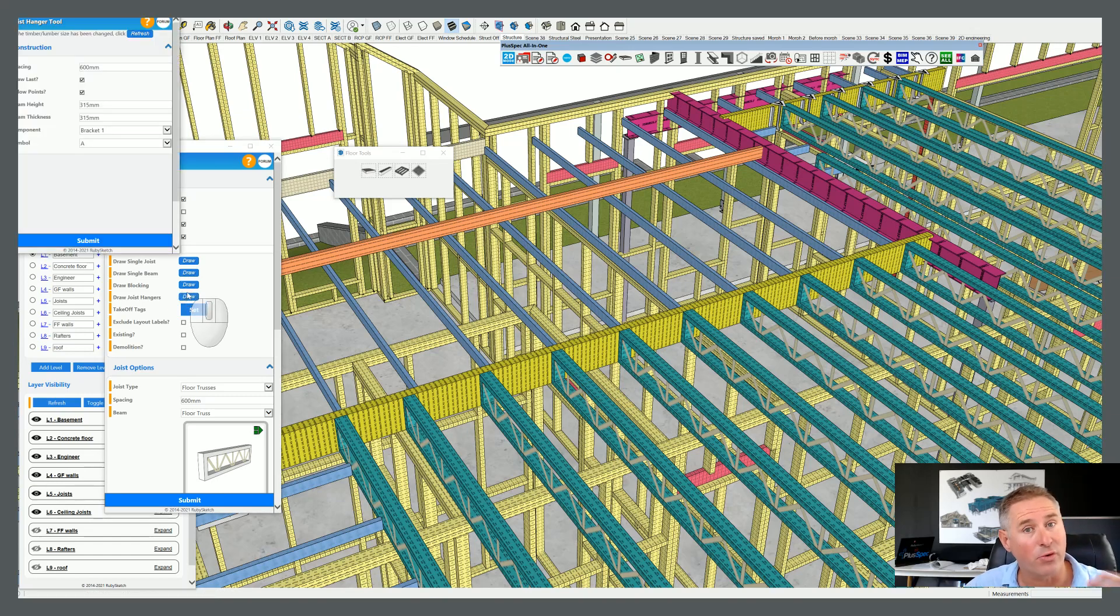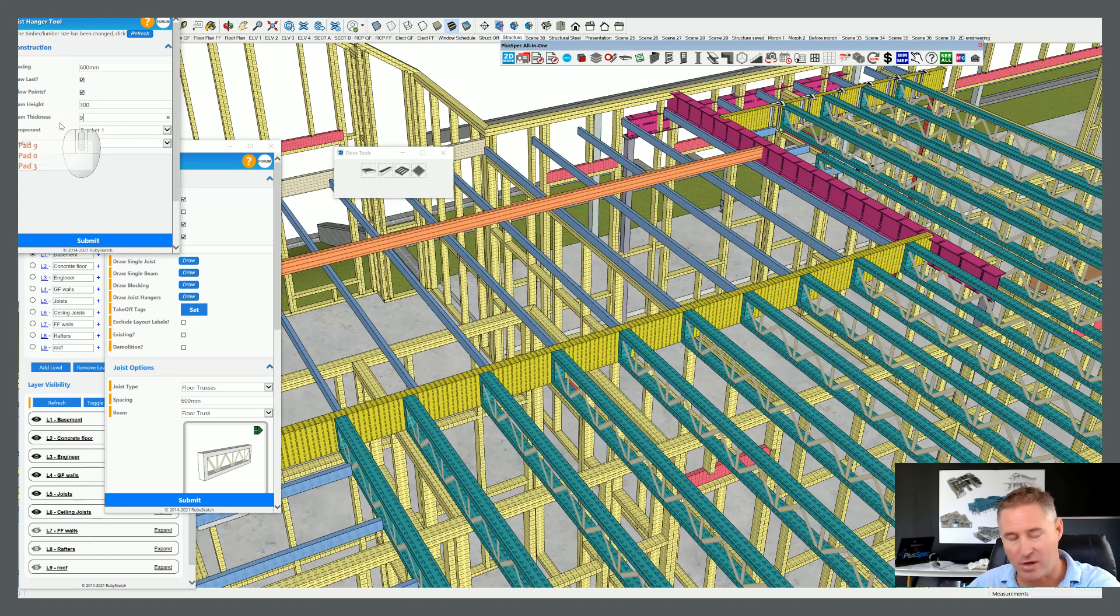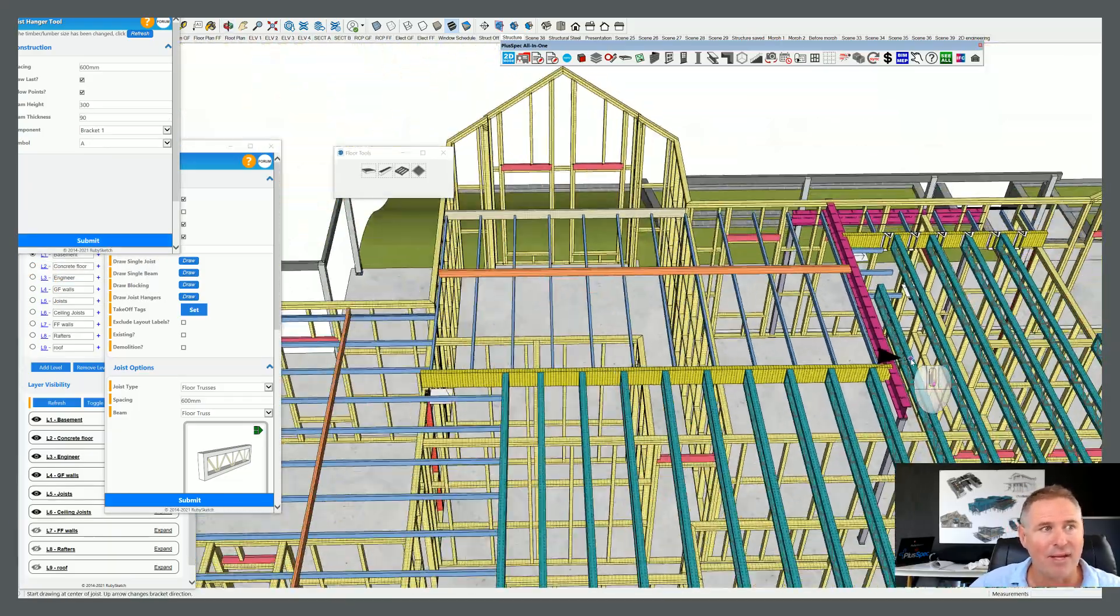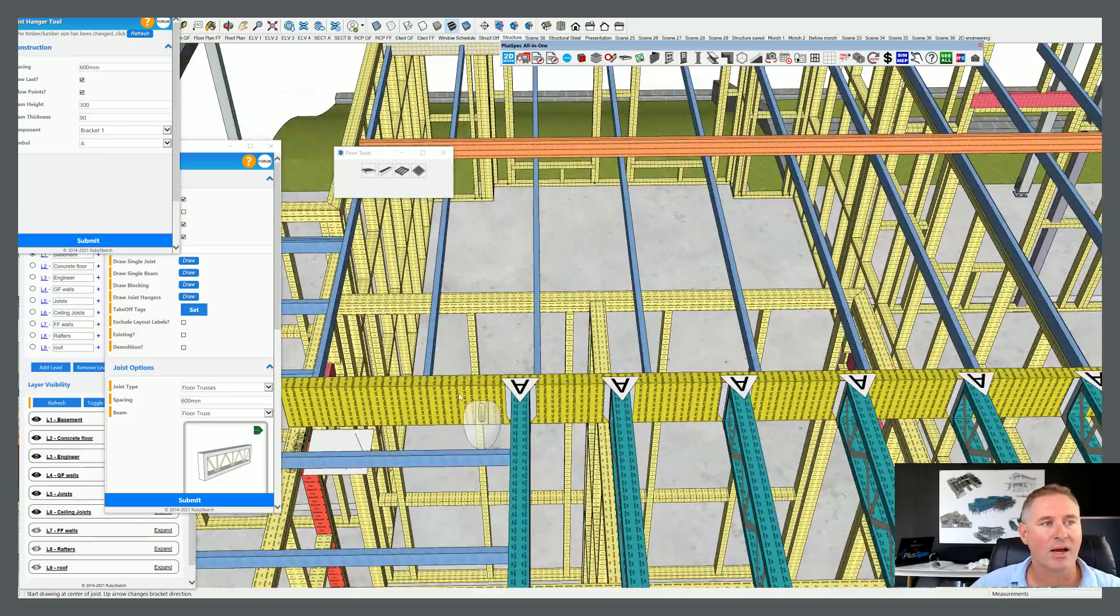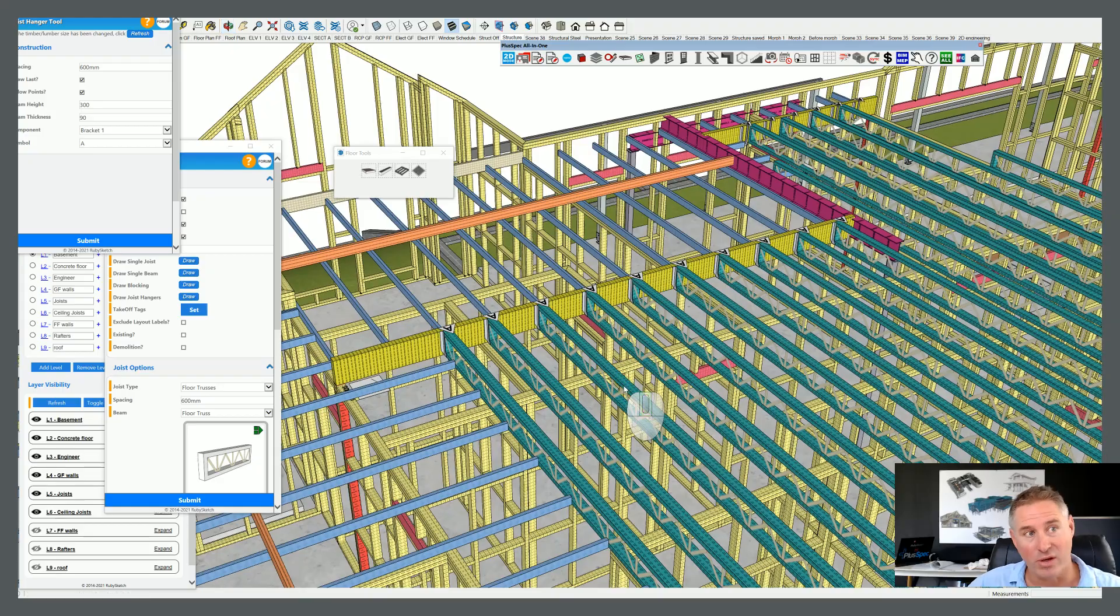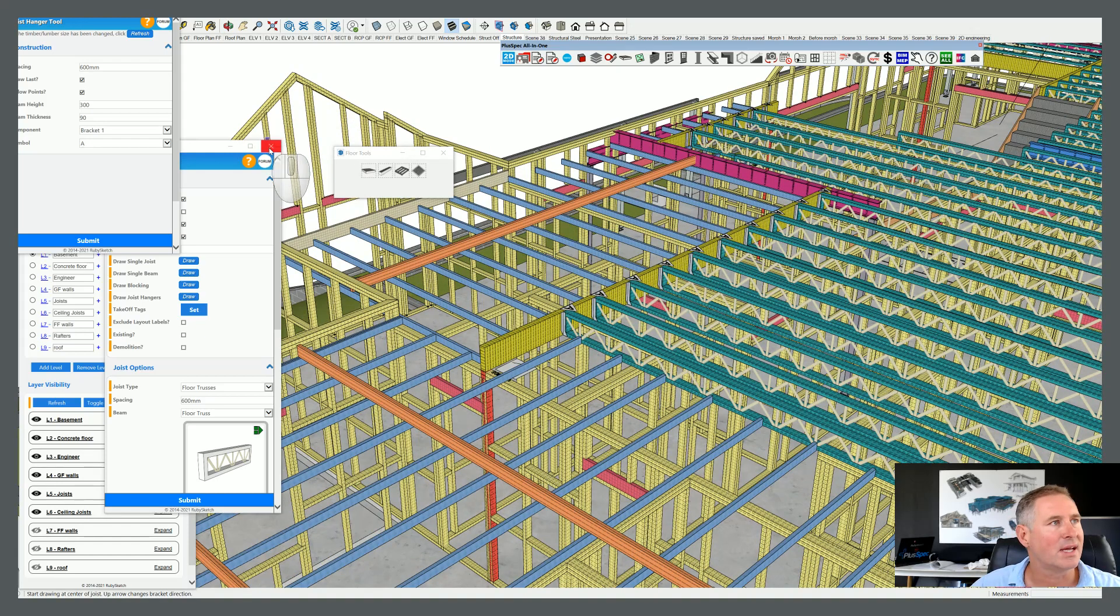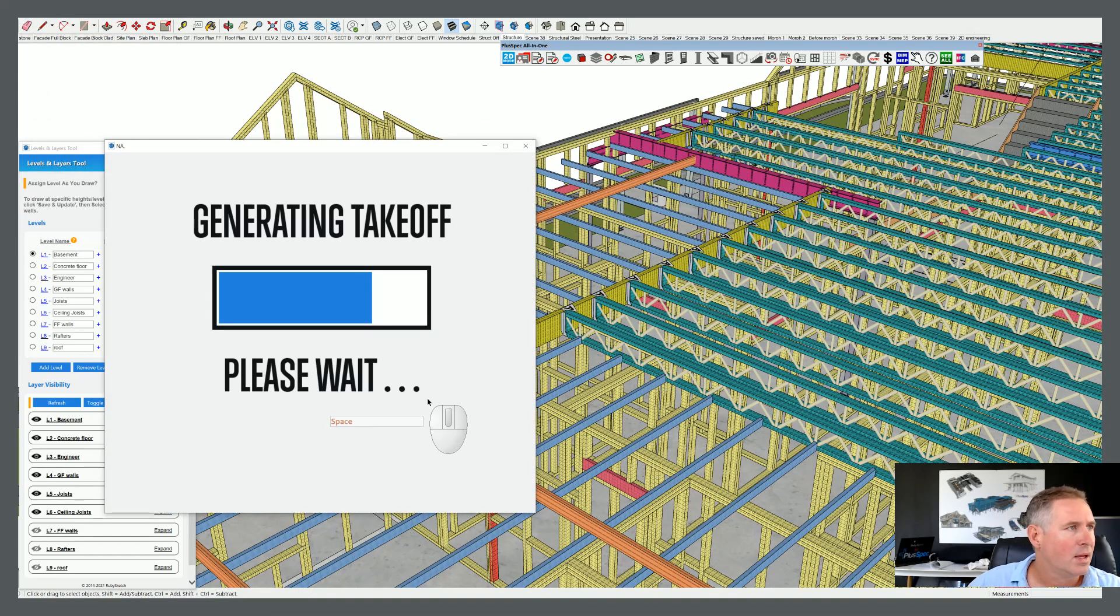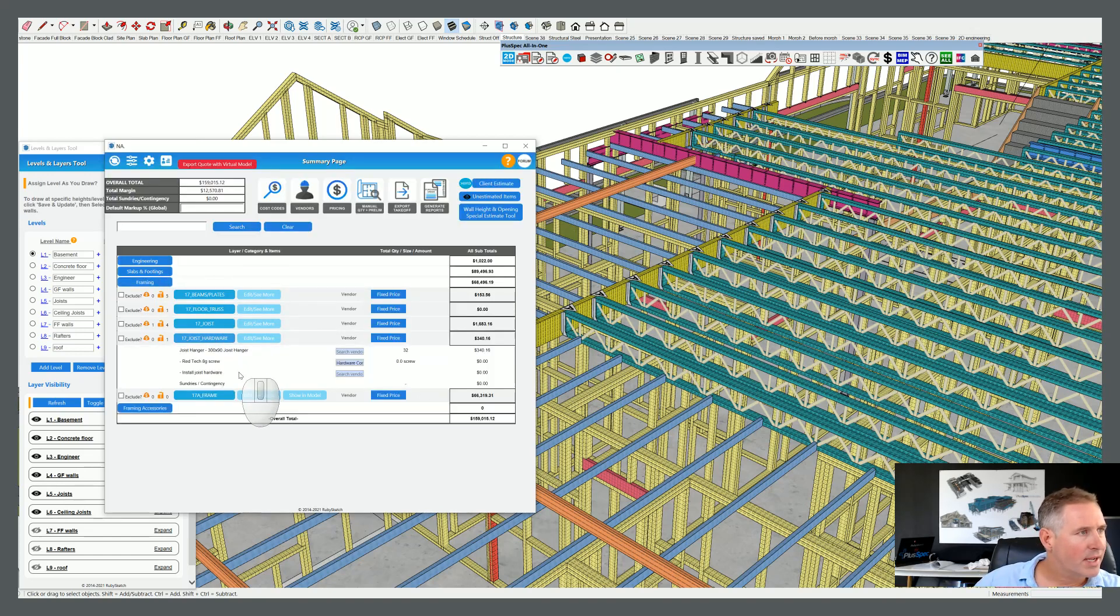My tip in this particular instance guys is to go through and do this last once the project is going to go into construction before you're about to order. That's when you save your money. You don't really want to go through and do this too early in the project. You're probably best off allowing, over-allowing for your joist hangers and your hardware early, or you can just delete like I did there, and that way you've got a budget for it but you can save your money.